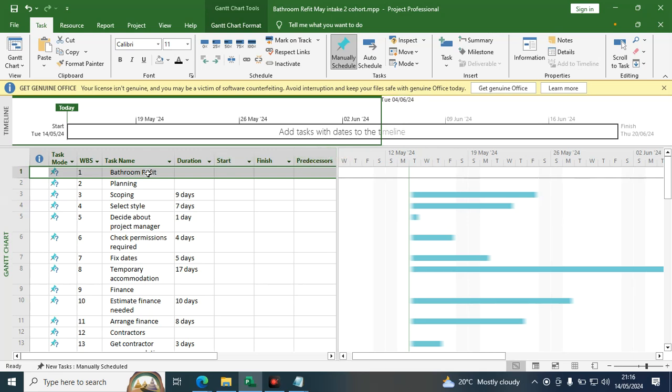And now the next step that we are going to follow, we have the project duration. We have listed all the activities and their duration. The other part, we have come up with the scope of the project. All the activities that we have here form what you call the scope of the project. Then we have listed the numbers, or what you call the work breakdown structure. Then our task mode is still in what we call manual scheduling, because we are adding activities or duration manually.